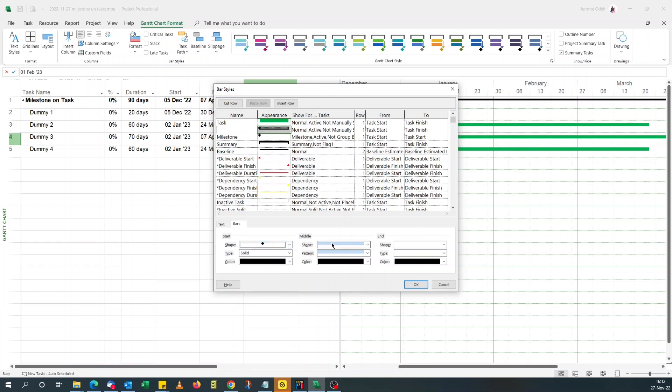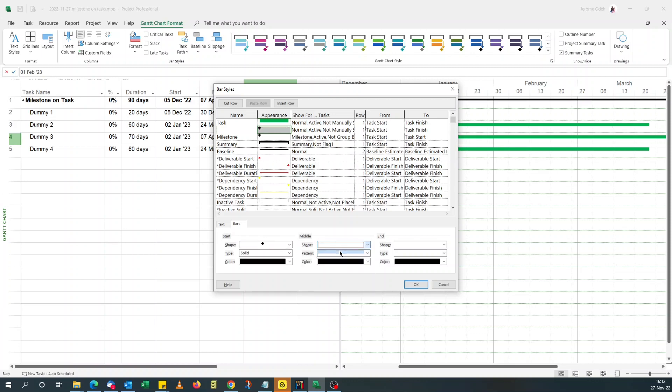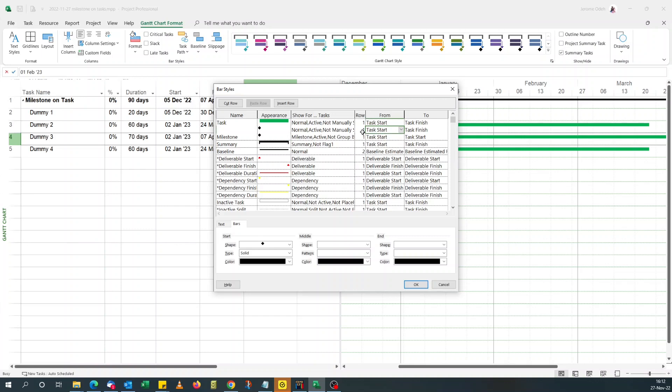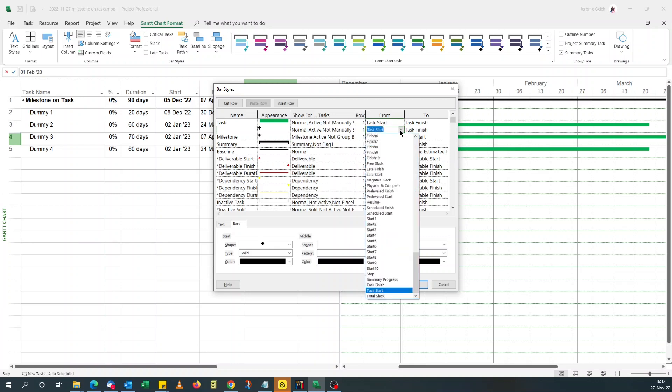For the start, because I'm using start field. For the middle part, leave it blank. That's the shape we want. For the row, because I want it to appear over the task, I choose row 1. If you want it to appear below, you go for row 2, but I want it to.